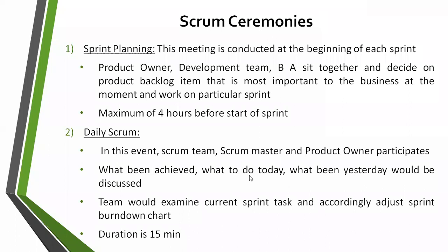If the story needs some more refinement, we'll identify that, and it will be on the sprint backlog, and we can review it later. But sprint planning is basically a kickoff meeting where the entire Scrum team sits together. They go through each and every story, or issue, from the Jira board generally, and then they allocate it to the resource also, and discuss that particular sprint's stories in a nutshell.